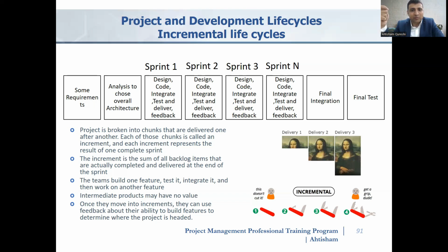Okay, and then we come back after 2 weeks, let's say, and show him something from the captured requirement, the software that is working, maybe one feature, something that we understood, and we are showing him. Okay, this type of life cycle cannot be used for a construction project where we stop every time, take some requirement, develop and then come back and ask. No, that project we will plan in one phase, that there will be a requirement phase, all construction related project requirements will be closed, and then design will be prepared, and one time the construction will happen.